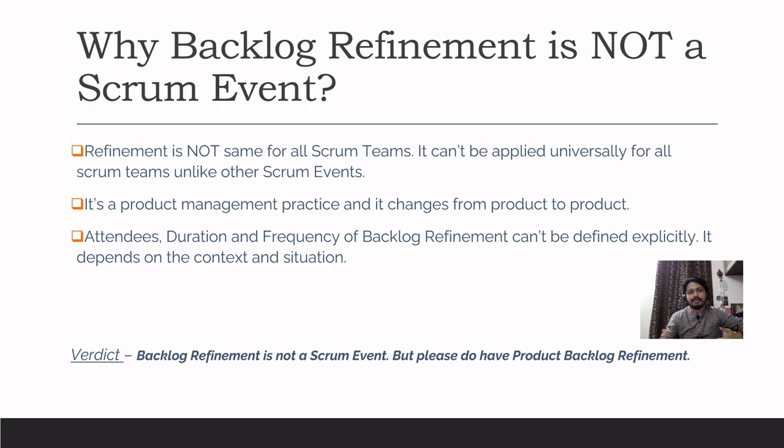But then there is a team who needs more time to do refinement, so they must be spending at least 10% of their time in a sprint doing the refinement for the next future sprints, right? So it again depends on team to team, product to product, and it's very contextual in nature.